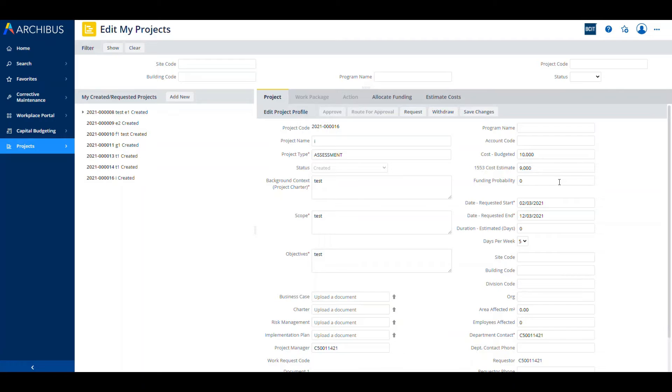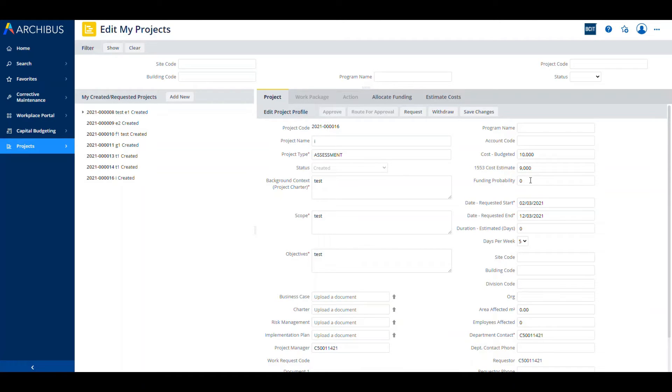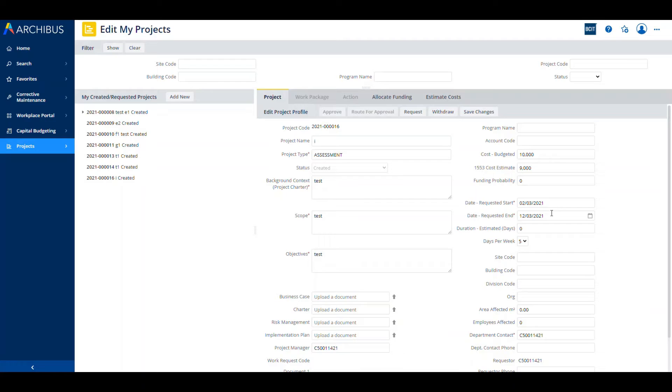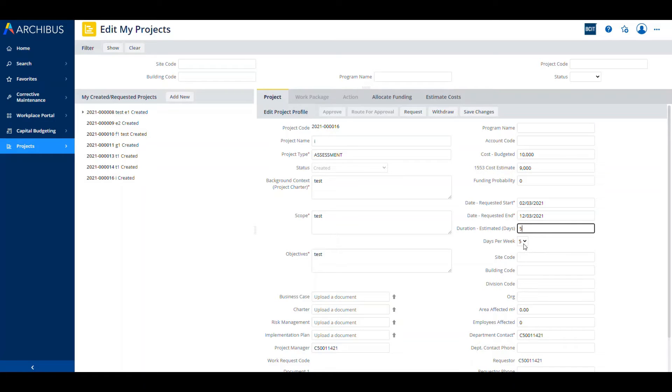Any mandatory fields will have an asterisk next to them. Funding probability is just an area that is pulled up in reports later on in the process so that people can look and see where things are sitting. The date requested, the start and end dates were already populated from the other form that we entered it in. The duration would be the number of days. We're just going to put five in here. Days per week affects how the Gantt chart shows up in a later stage, so you can put that as five, six, seven, whatever your days per week are.